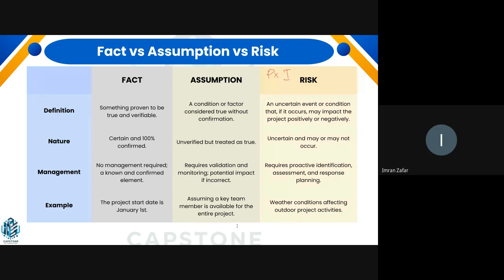We should be informing our project team and the PMO as well, because if we have a controlling or directive kind of PMO governing the project, they should be notified about the risk, what kind of impact it could have on the project, and what mitigation or rectification strategies you have in place to deal with the risk if it happens. Communicating the risk to your customer